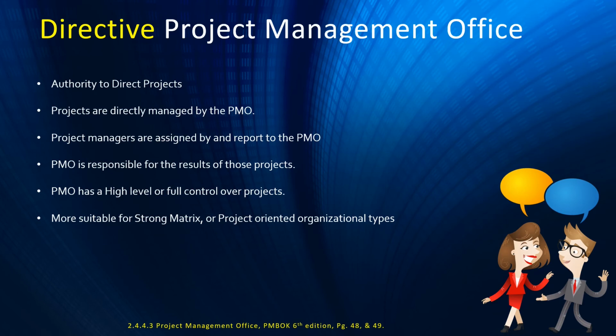They enforce compliance to the framework or methodologies, and they provide all the support, just like the supportive PMO. And the directive PMO has high power. They direct projects, they have project managers working for them, and they have full control.